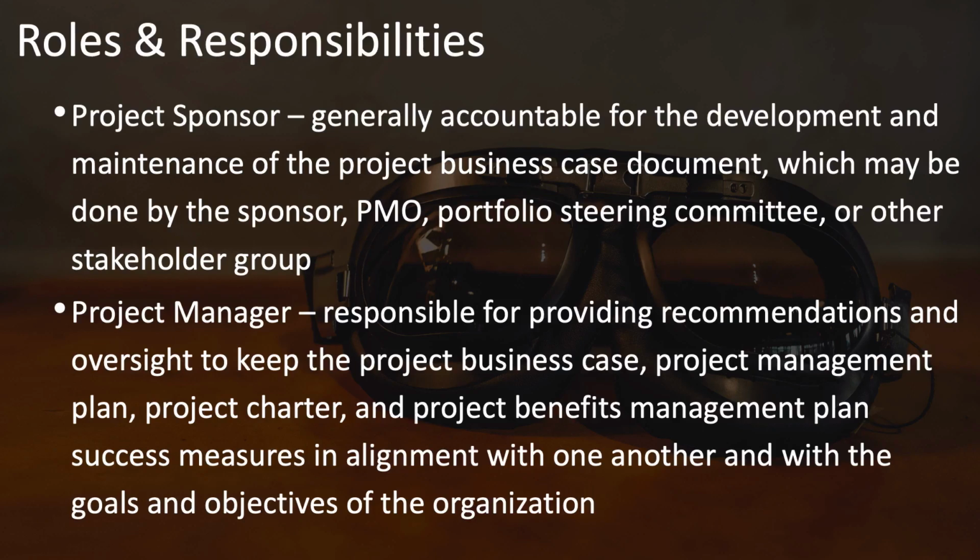However, the project sponsor doesn't have to be the one to create the business case or even to maintain it. The sponsor simply needs to be the one accountable. So it can be anyone in the portfolio or very oftentimes the project manager who is responsible for putting together the project business case, but the sponsor is accountable for it.